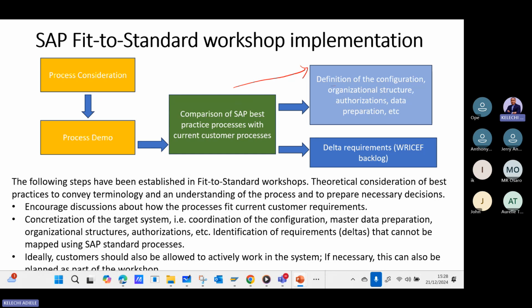Once that is signed off, the next process starts, which is they have to come up with a configuration file that has to do with all the things that they need to configure. They need to start doing data migration. They will start planning system integrations and all that. But we need to get to this point by next week, which is when our project is starting. We'll discuss that as we move on.